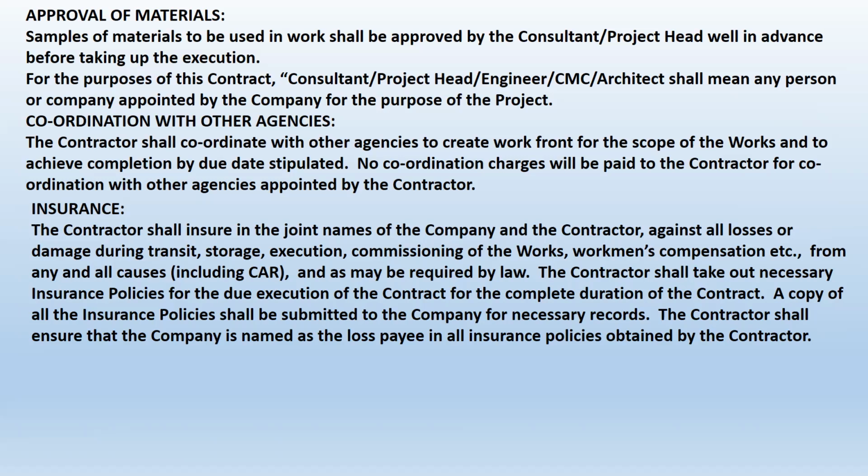If there is any other coordination to be done by the contractor, in what way you will be coordinating, what is his limitation, and all these things have to be identified. Then comes the insurance. Insurance is a major part. You have to identify that the contractor has to insure the laborers against the Workmen Compensation Act, and all materials against theft, etc., under CAR policies.